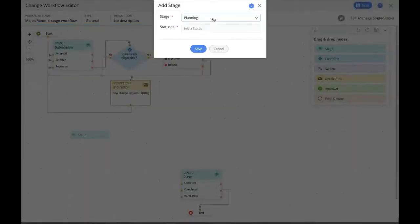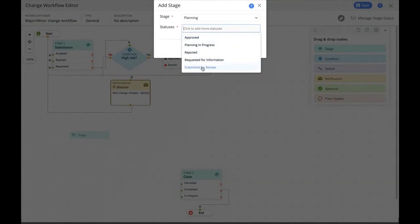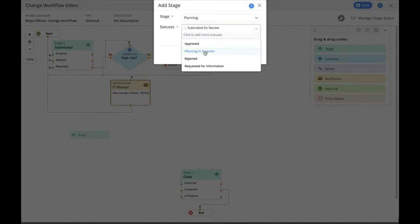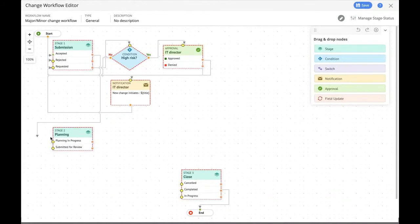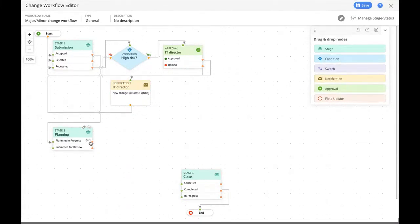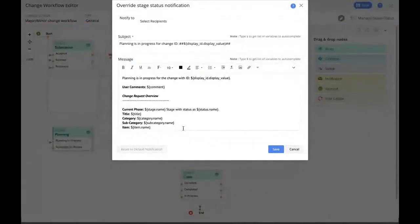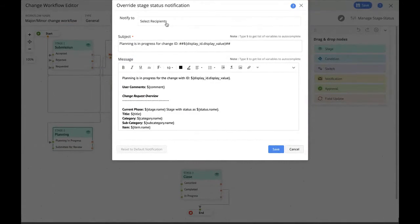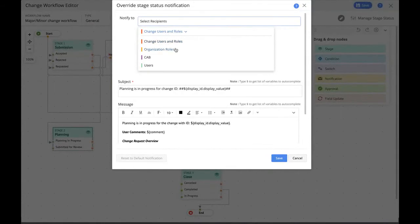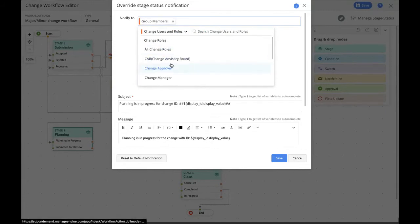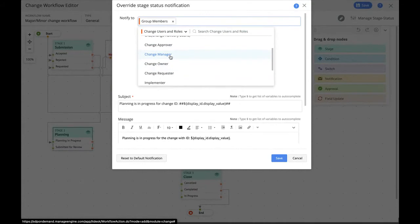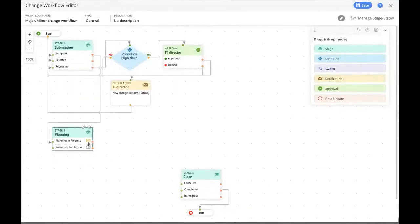Next, let's add the planning stage with statuses 'submitted for review' and 'planning in progress.' From the submission stage, we drag a connector to the planning stage. Under 'planning in progress,' we click the envelope icon to automatically send notifications when the change request arrives in that status. We can choose organization role, change users, CAB, or anyone. The idea is to notify change stakeholders that the change is accepted and it's time for planning — calling all change group members to plan for the change. The yellow envelope signifies a notification is sent when the change takes up that status.